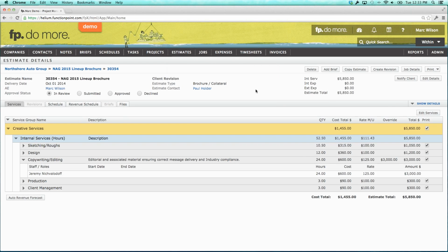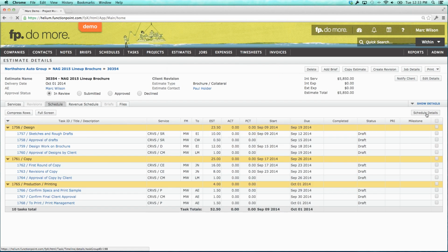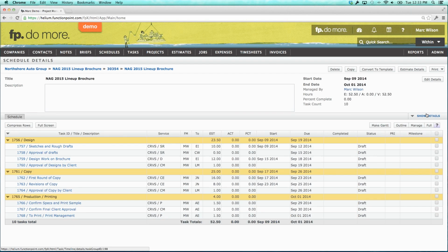It is mostly one way. There isn't an option to have the estimates update the schedule, I believe, but you are able to have the schedule update the estimate. And actually, I'm going to ask you to help me out with this one. Am I correct on that? If you're making updates to the schedule, you can have it reflect on the estimate, but not the other way around. You can, yeah, absolutely. And most of our clients are happy with that. They do have them sort of living separate lives.